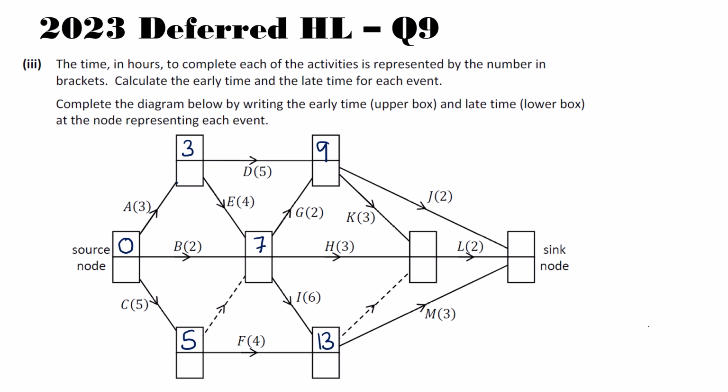And then let's move down here. I have 1, 2, 3 nodes feeding in. So if I go K, it'll give me 12. If I go H, it gives me 10. The dummy gives me 13. So the dummy is the one that we want to work with. So that's a 13.